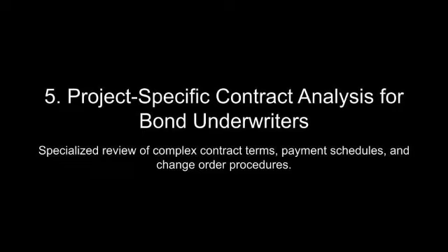For instance, a contractor terminated for convenience may argue for reimbursement of anticipated profits on unperformed work, while the project owner might contest such claims, citing contractual exclusions. The surety, in turn, becomes entangled in the financial and legal fallout, often facing claims from both parties.